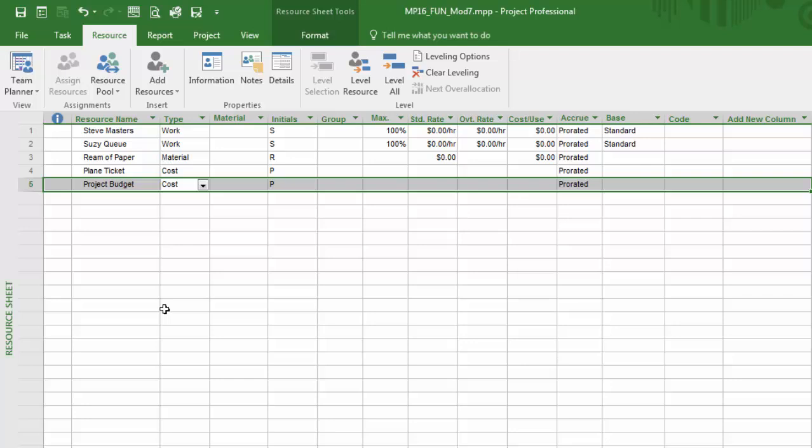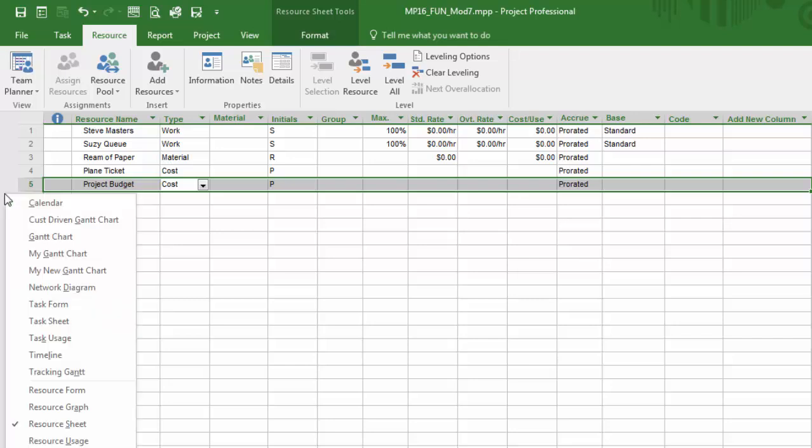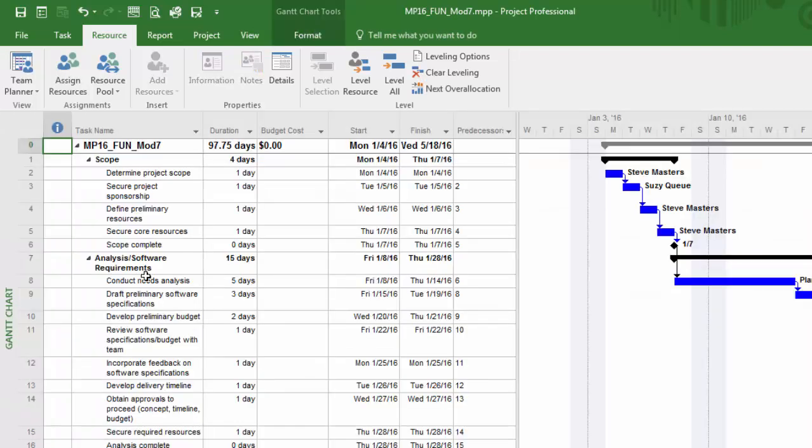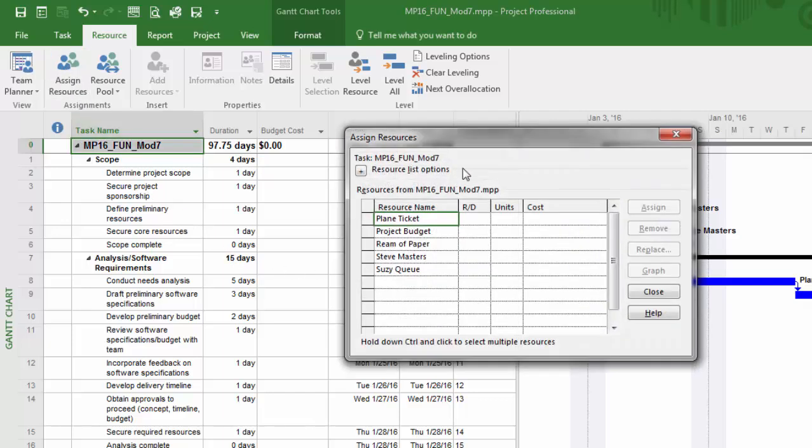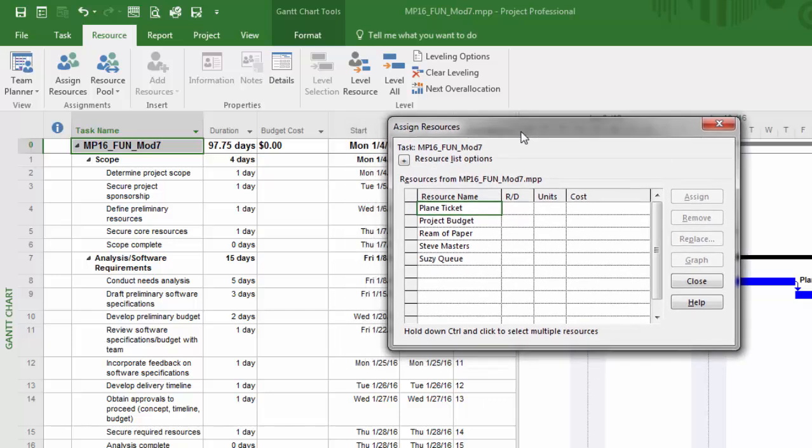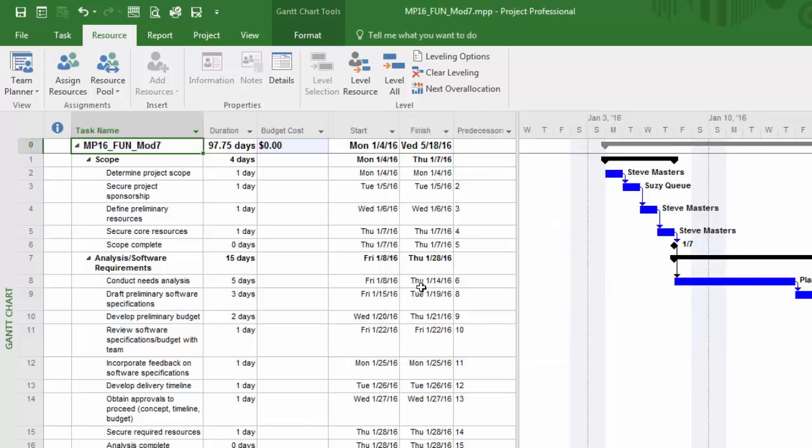Now we can assign this resource to the project summary task. Right-click again, go back to the Gantt chart, and I'm going to click on the project summary task and assign that resource. I'm now looking for project budget, I'll click assign and hit close. Even though I performed that assignment, nothing changes from within this screen.